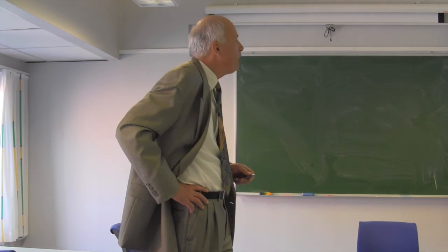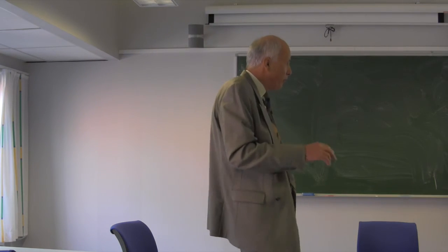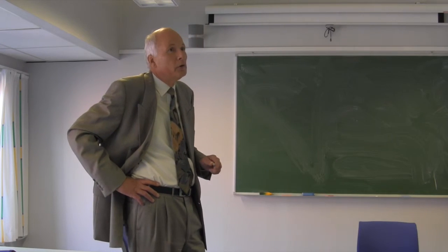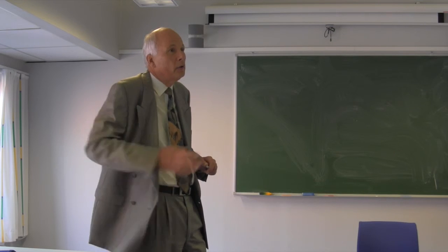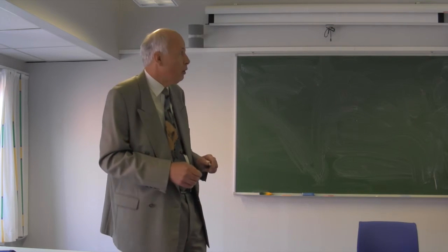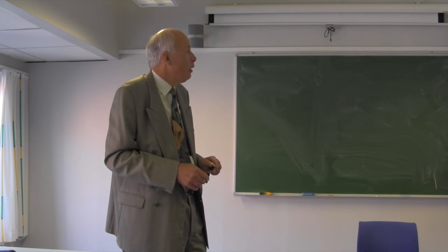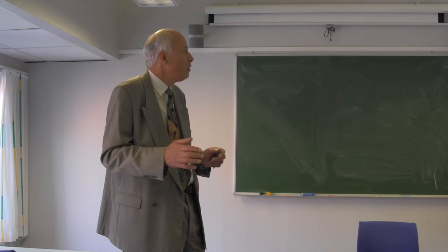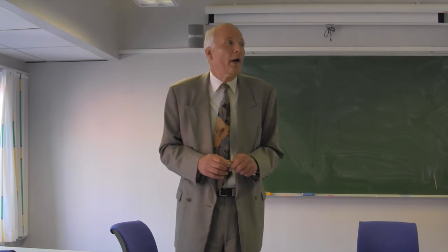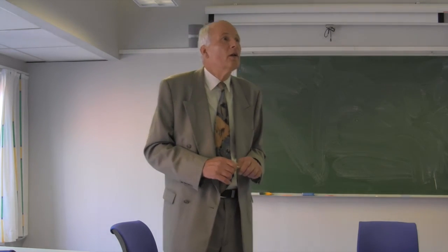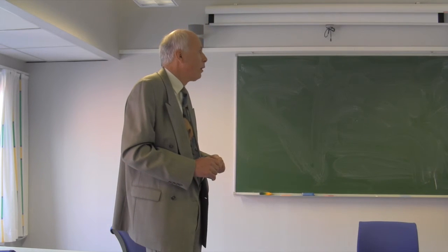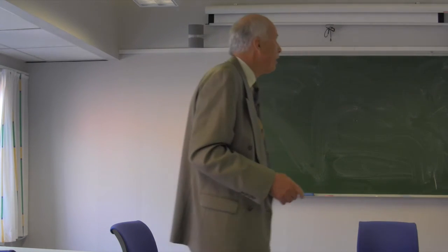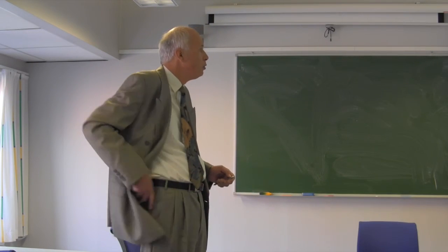And the implementation will be written down in an order, and from this general order, individual orders are determined for the engineers who have to do a certain job. Okay, the requirements or documents are changed, and the next step is to realize the new physical objects. And then we have to look at the conformity, etc. So these are the steps we have to do.